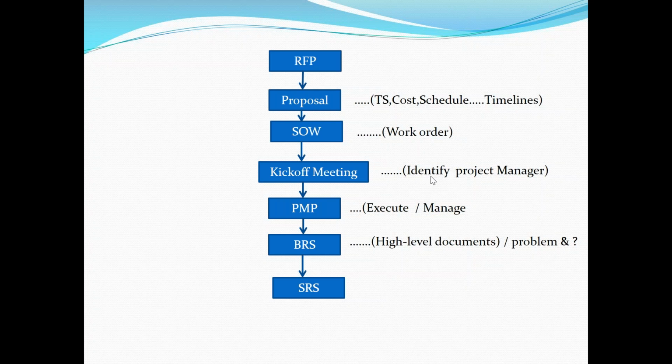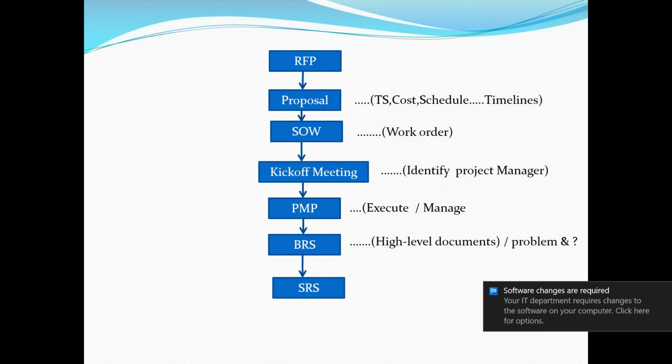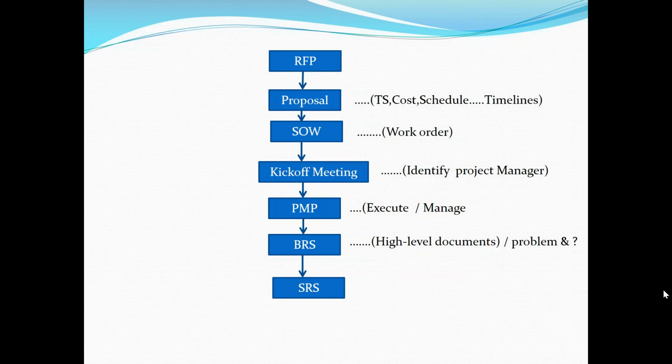So what will the project manager do? The project manager will prepare one document. The document is nothing but the PMP. This is very, very important. PMP is nothing but the project management plan. Once the project manager is identified, the project manager prepares this document, the PMP, which describes how we need to execute, how we need to manage, how we need to control, and how we need to close this project, each and everything.